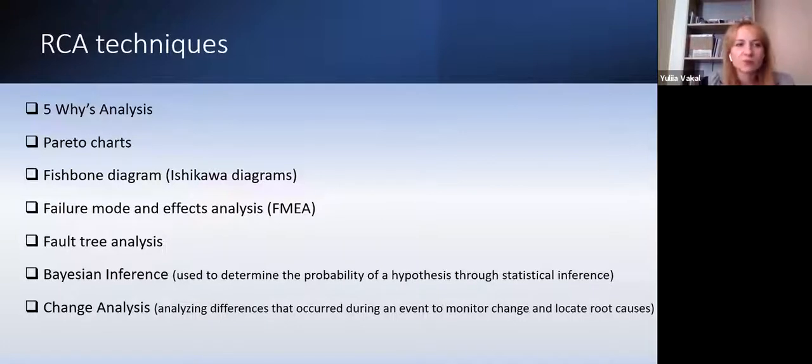Because some of them are very simple, like 5 whys or Pareto analysis, or more complex like fishbone or failure mode analysis or fault tree analysis. So it very much depends on your organization and on the problem as well. In some industries like aviation or healthcare, fault tree analysis and fishbone diagrams are a must have. They don't usually use 5 whys or Pareto charts. But if it's a small company and you want to do something quick, you can start with simple techniques.